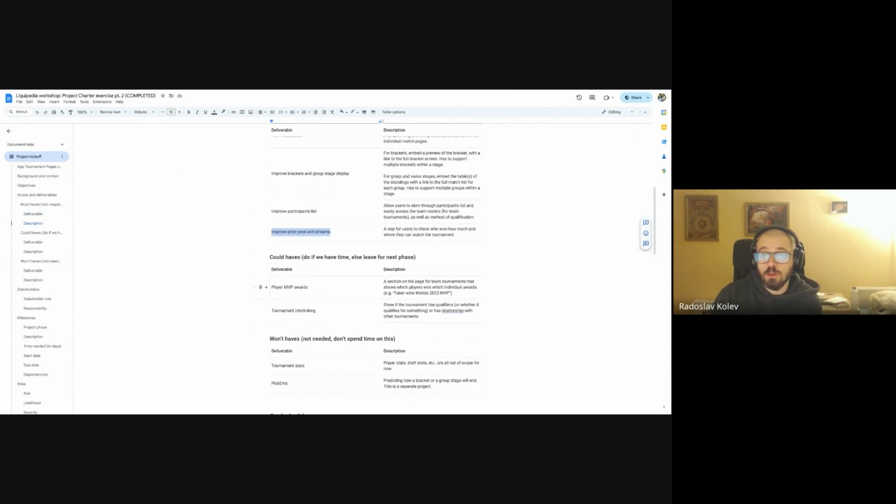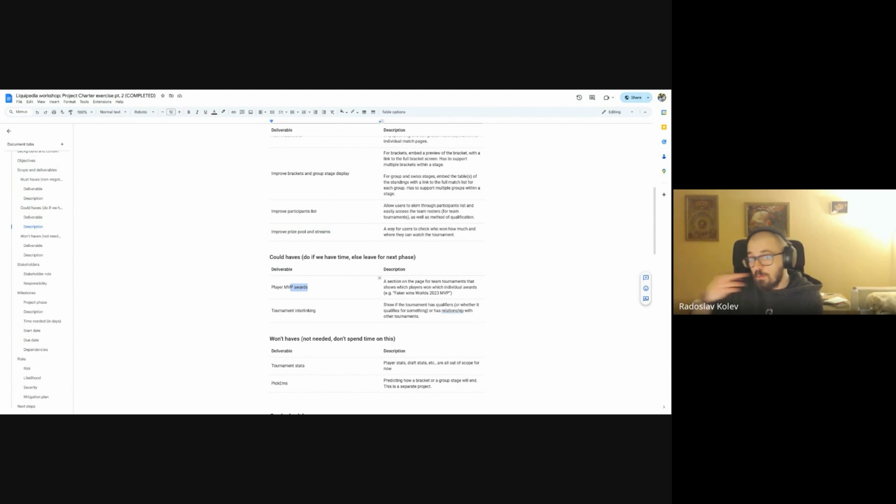In the MVP, I mentioned the MVP awards, but another could-have for us was tournament interlinking. For example, if a tournament has qualifiers, we list them somewhere. Or if two tournaments are connected in any other way, maybe they're part of a series or a circuit, we list them. We couldn't figure out how to do it smartly in time. So this was a could-have, and we never worked on it, but now we're thinking about doing it.